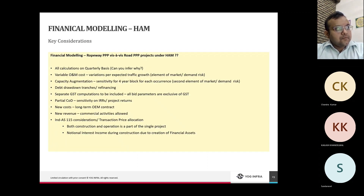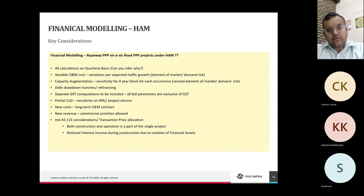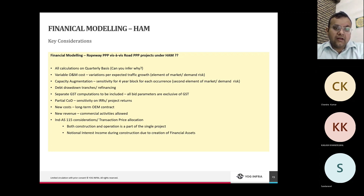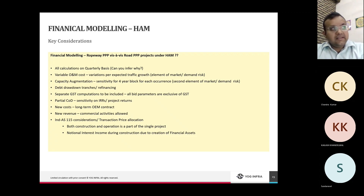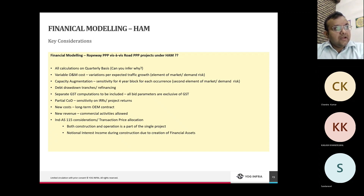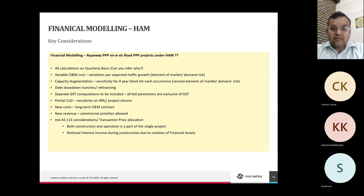On the comparative analysis of financial modeling for ropeway vs. road PPP projects: first, all calculations for ropeway PPP projects should be on a quarterly basis, since O&M payments are quarterly — this gives greater accuracy. Second, the variable O&M cost introduces a revenue-side variable dependent on passenger traffic, requiring sensitivities to be built around passenger demand — unlike road PPP projects which have a fixed O&M payment.